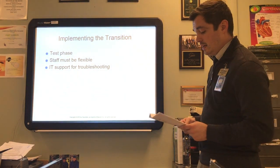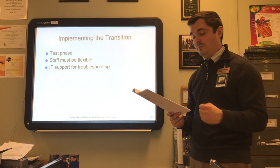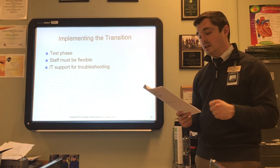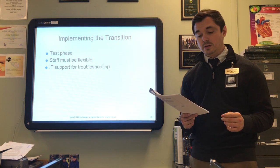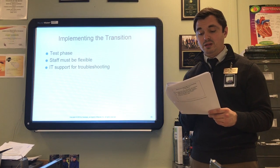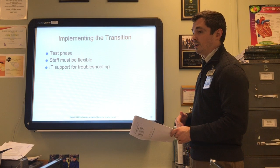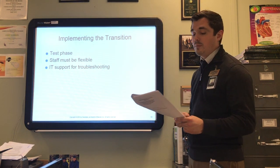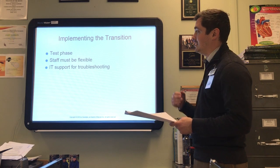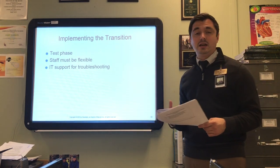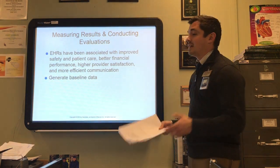Implementing the transition requires readiness to launch: the installation of technological resources, completion of staff training, existence of funding to carry the practice through the transition period, and availability of staff and clinicians. As the EHR is put into use, the plan is tested and its limitations quickly become apparent, so it's best to have a test phase. Staff must be flexible to handle issues with tact and ease, and IT support should be utilized for troubleshooting through the IT department and EHR vendor customer service.